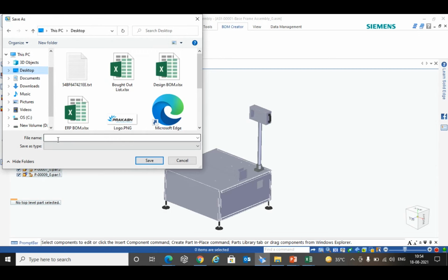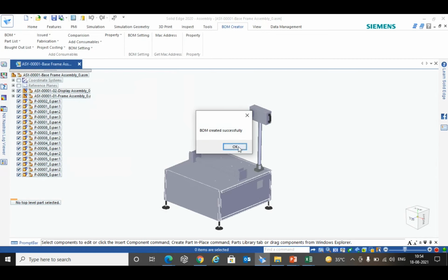So how does this help me in planning? This basically helps me in planning in such a way that I could take the items with higher manufacturing lead time as the first priority, because I need more buffer time for the manufacturing of that component, right? So now I can categorize it. Automatically, the items with higher manufacturing lead time become part of my high priority part list, right?